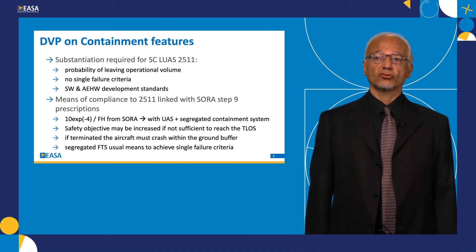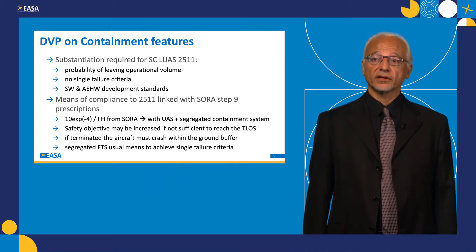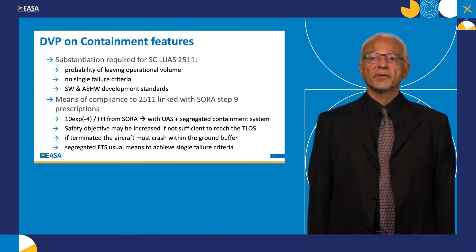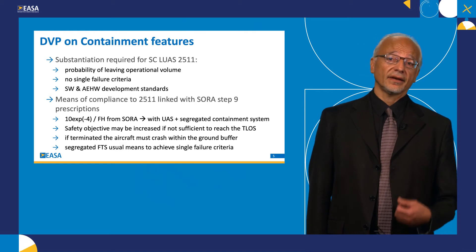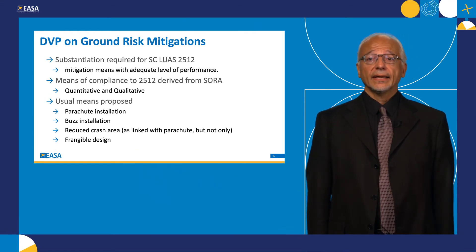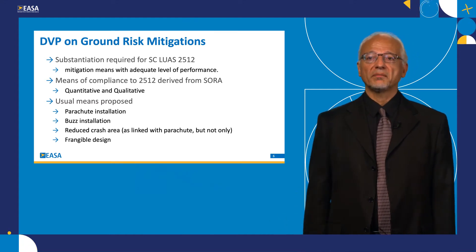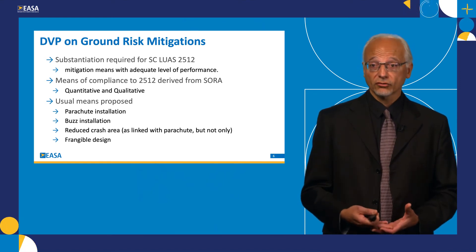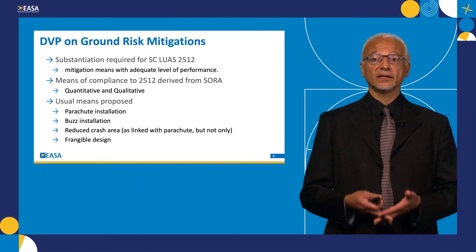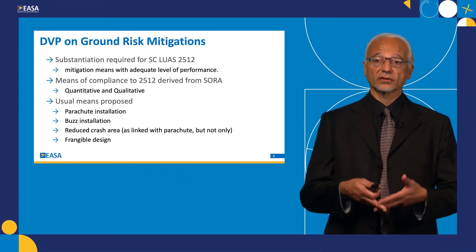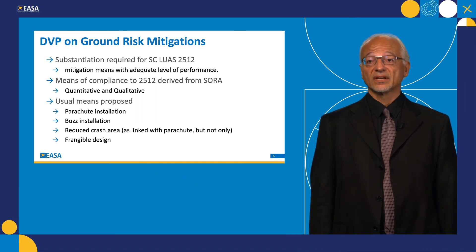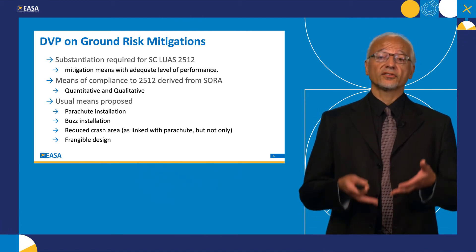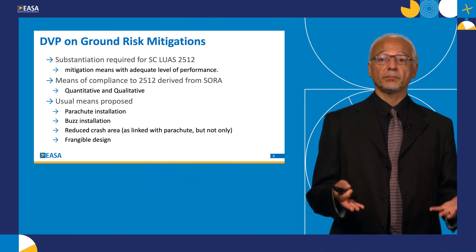The second possibility for a more limited design verification project is for ground risk mitigation. In this case, the only requirement triggered is 2512. Mitigation means must have an adequate level of performance. The means of compliance for these requirements are taken from the SORA and have both a quantitative and a qualitative part. The usual means proposed to meet these requirements by applicants are parachute installations, because we are talking about containment of the drone's dynamics — reducing kinetic energy so that the probability of causing a fatality is lowered. A parachute installation also typically reduces the crash area, further reducing risk. Sometimes a ballistic installation is proposed, and also frangible design — drones with a frangible design tend to transmit less kinetic energy to any people they may crash upon.